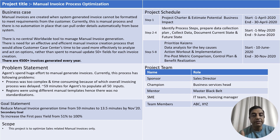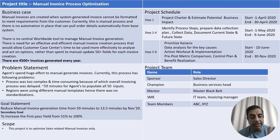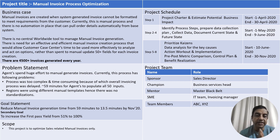The first thing the team did was to create a project charter. The project charter has six elements: the first is the business case, the second is the problem statement, the third is the goal statement, the fourth is the scope of the project, the fifth is the project schedule, and the sixth is the team charter.